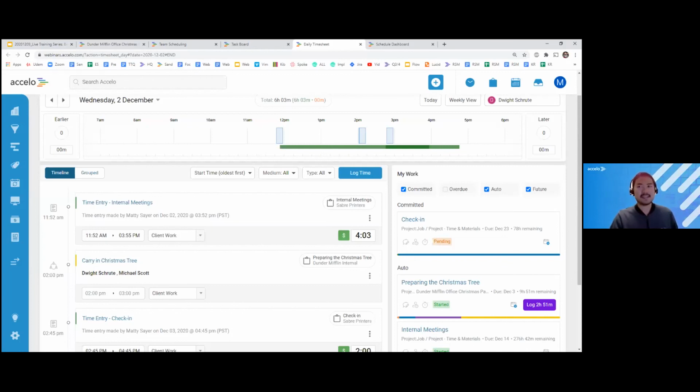If the task is set to run based on staff rates, then whichever rate you personally own, that's the rate that will be applied. The task could also belong to a project that falls under a retainer, and the retainer rate is the rate that's enforced. Otherwise, if the task has its own dedicated rate and a rate card commands that that rate is changed for that specific project, then it would be the rate card's rate that applies. So a lot of rules in place that can override other rules. It just depends on the situation.